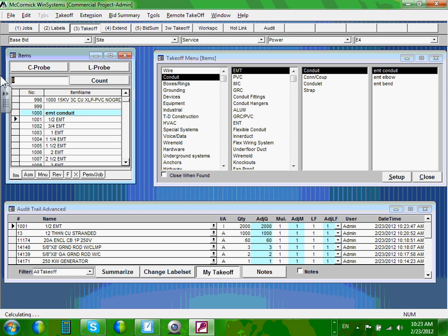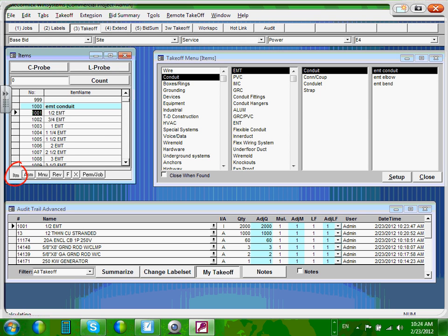One more time. Work with assemblies. If you can't find what you're looking at as an assembly, guys, please always click on item here. It will get you everything here converted. This is interesting. When you hit on item, everything here becomes an item, meaning what you see is what you get. If you hit assembly, everything here converts to assemblies. What is an item? An item is a receptacle, a yoke is a yoke. An assembly, when you take a receptacle, it's a yoke, a cover, a box.